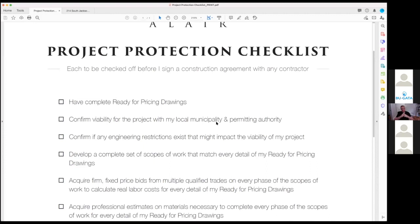We have lots of discussions with our clients about what sort of addition they want. And I'll tell you, in Arlington, and if you live in Arlington, you know this for a fact, most additions center around a real master bedroom suite, a real kitchen, and actual closets. And those are the most exciting things for most folks to have in their home, as well as screen porches and outdoor living. So when we're looking at those spaces and trying to develop a range of cost to figure out if it's worth the client's time to go into the drawings, we're really working with a wide variety of costs. And we can legitimately have 20, 30, 40% difference in relative cost when we're doing that back of the envelope sort of calculation.